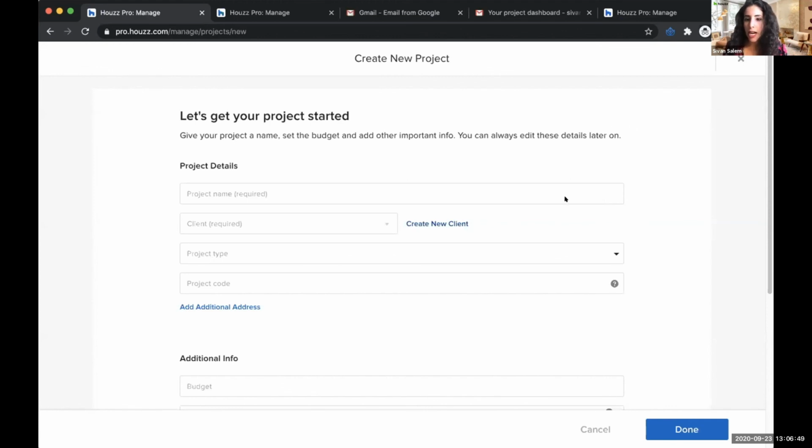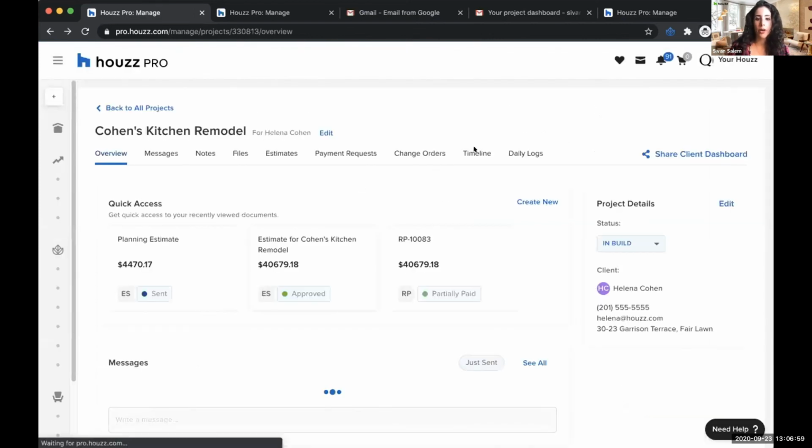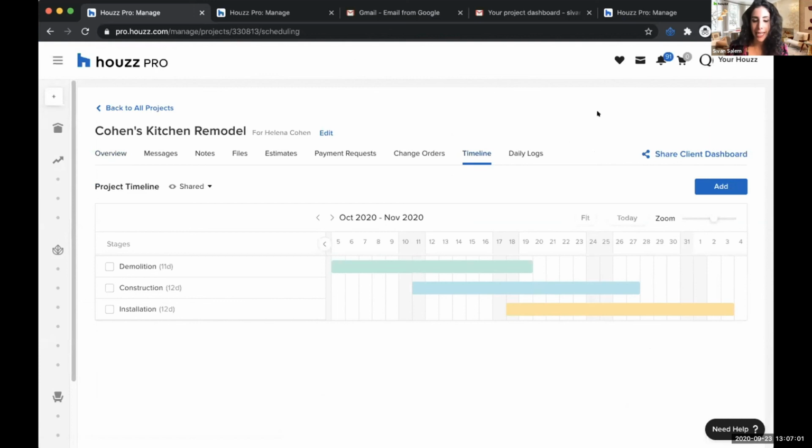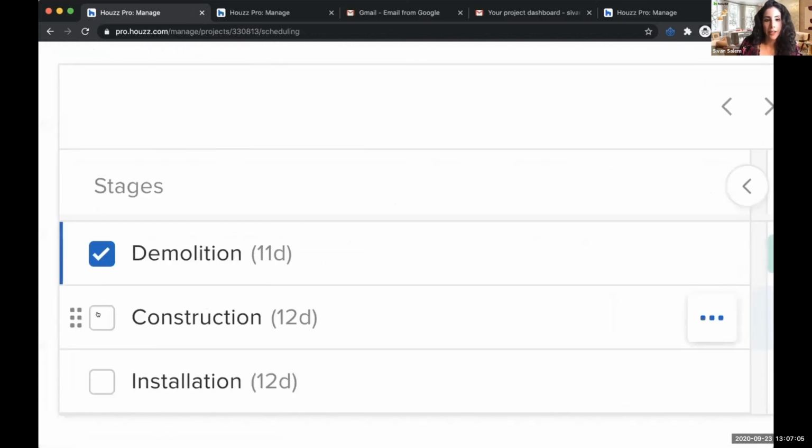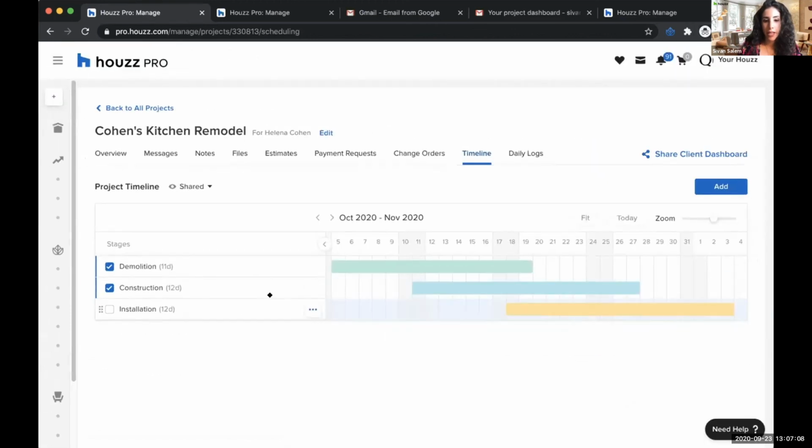Cool. Please reshow how to make the stages depend upon each other again. Happily, GB General Carey. I'm going to show you that right now. So when I go into my timeline, again, I'm on production. All you need to do here is actually select the stages. And then when you move them over, you'll see that they move in unison with one another.